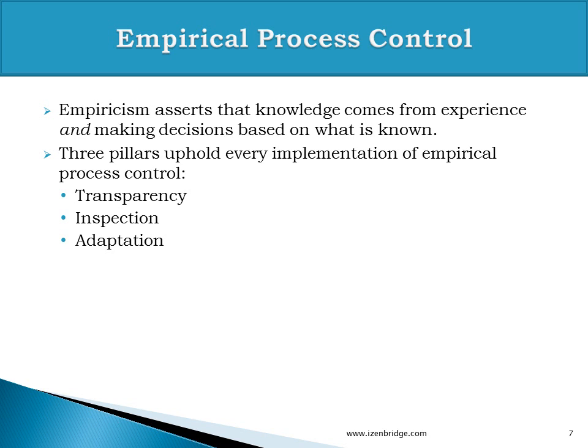Defined processes get controlled by measuring the variance or deviation of the output against an expected outcome. Now, since empirical processes are not yet fairly defined, you cannot control them using an output variance. For example, if I know that this particular problem always takes 7 hours to solve, and I have historical data which says the mean time for solving this particular problem is 7 hours, I can always control my developers, my programmers, using that benchmark. Whenever they go beyond 7 hours, I can raise the flag and ask what happened.